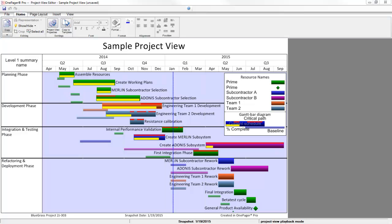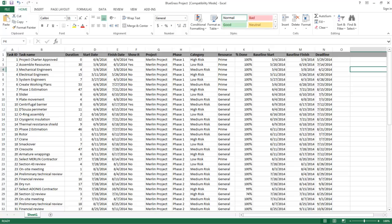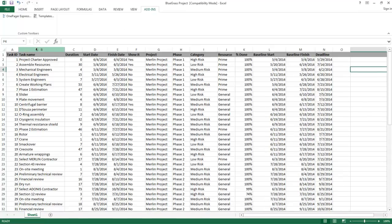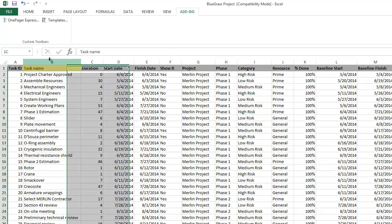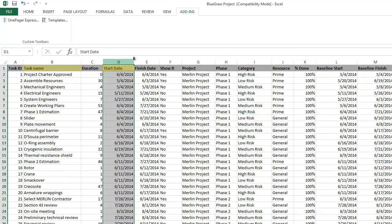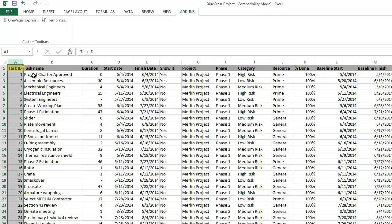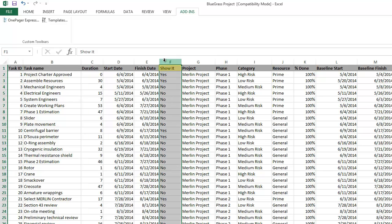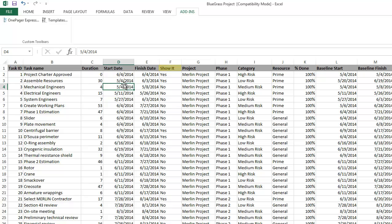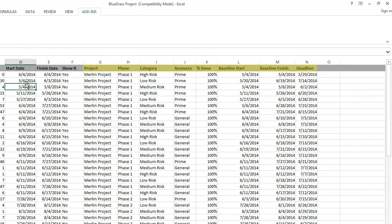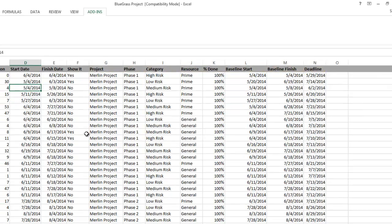All right, let me flip over to Excel now and show you how this works there with OnePager Express. Again, Express is not a trimmed-down version of OnePager Pro as the name might suggest. It just works with Excel instead. The basic data you need in your source file in Excel is the same as Project. You need a task name, a start date, and a finish date at a bare minimum. However, a unique ID will help OnePager recognize each activity or milestone during updates, and a column with yes values will allow you to be selective about what you're pulling into your view, similar to the flag column in Project. If you have other columns in your data that you'd like to map into your OnePager file, that's easy to do.